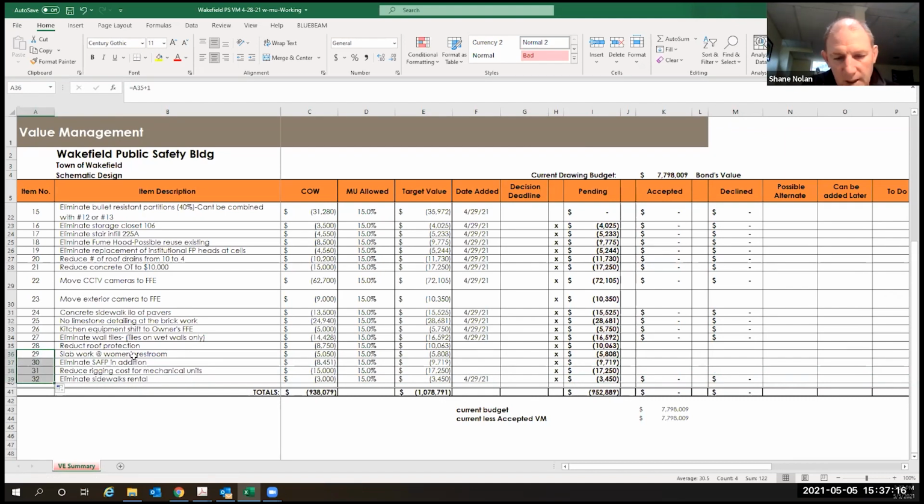I did go back and look at the FF&E. I've assumed that all the new furniture will be new. I don't know if people have the appetite to run through that quickly. You may be able to find, you know, 40, 50, $60,000 in that. We can hold off on that. Yeah, I think maybe we can target $60,000 saving in FF&E, and we'll work with the police to see what can be reused. We also have some contingencies too. Any chance the window treatments could be FF&E? That sometimes is something that owners will take direct. I'd rather when they're screwing into your work that they do it under you. Yeah, absolutely. But just a question since we're going through everything else.